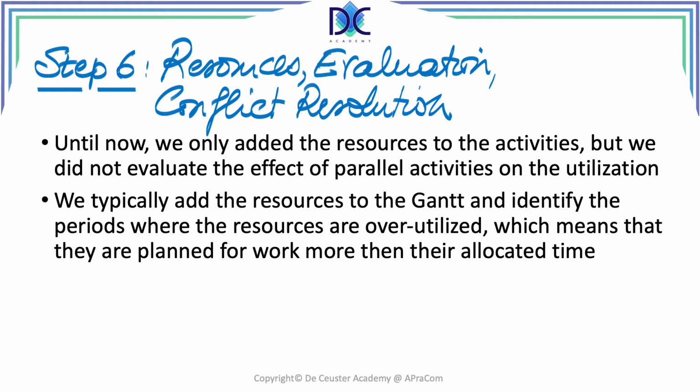You will only have to pay more if you have to pay them by the hour, and it's better to see that the people work exactly the time that they need. I'm not against overtime, but in planning, I'm not trying to use overtime because then I'm already losing a certain amount of slack, which I would have available later.